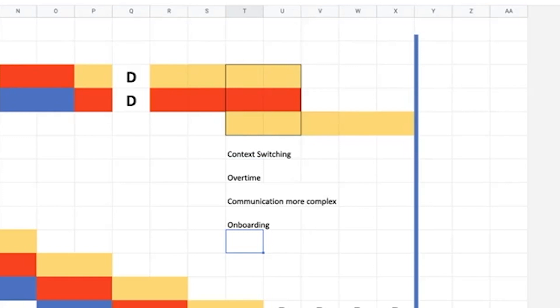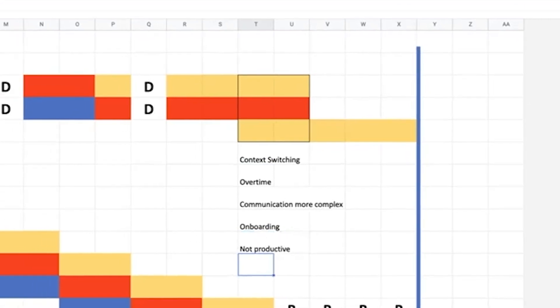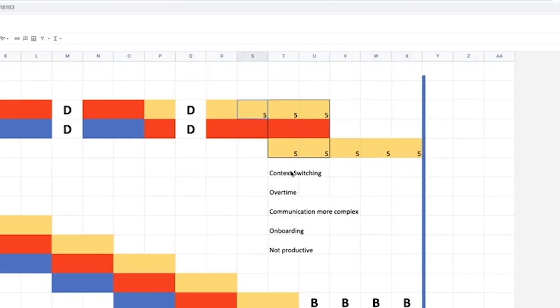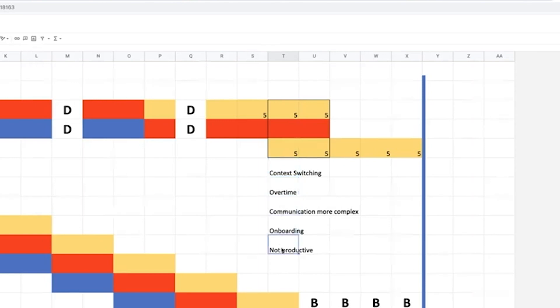It means that you are not productive. As soon as you go, like, let's say you had five workers for this crew, consistently at five, and now you need 10. Those additional people will not be productive because of context switching, overtime, communication complexity, onboarding, and the team not being familiar with the work. You will actually lose production if you bring new people in there.